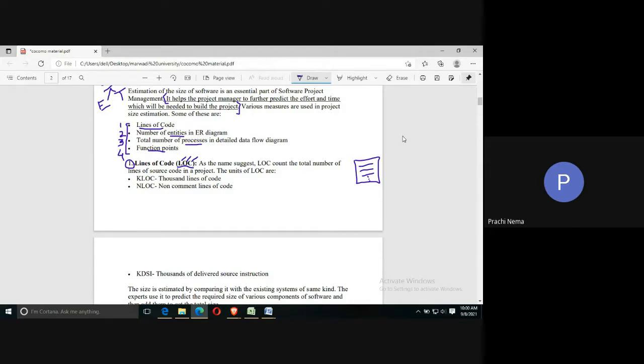So for that, what the technique involved in estimating or counting these lines of code does is that it takes a reference. See, a similar kind of software would have been existing already. There must be a similar kind of software. So it will take that software, it will add its feature and an estimate of how many lines of code this feature will use.